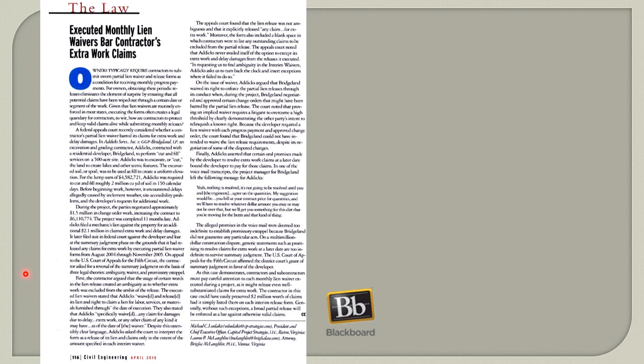He was required to submit waivers of lien, which basically said, I've been paid for everything up to this point. The document he had to submit allowed him to say, except for these outstanding claims. And he failed to check that box. And so he was not allowed to recover these additional costs. So again, just reading the prints may not be sufficient. You may be required to understand how it is all put together so that you wind up getting paid for it.